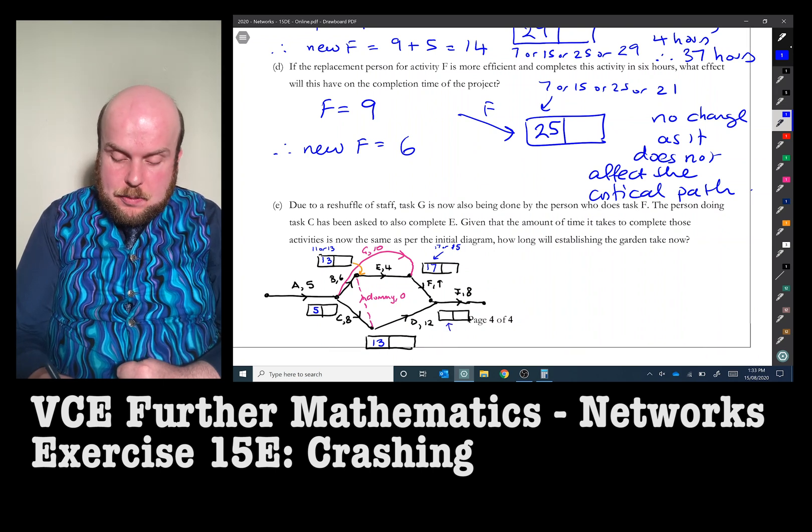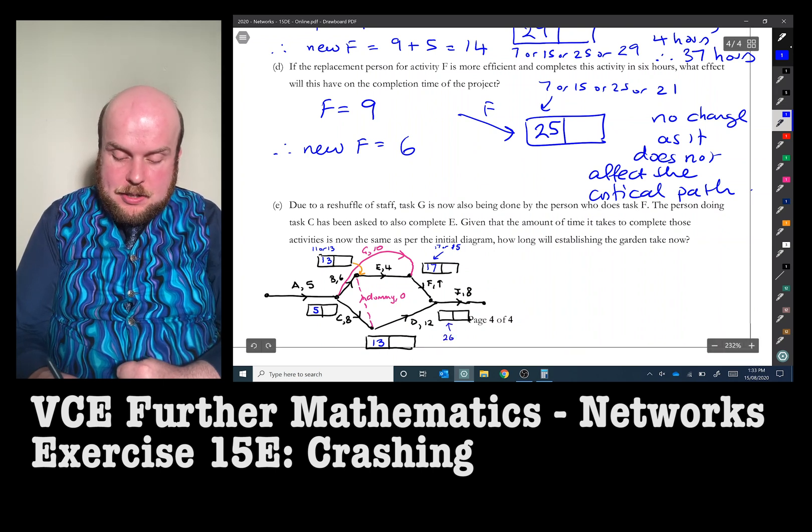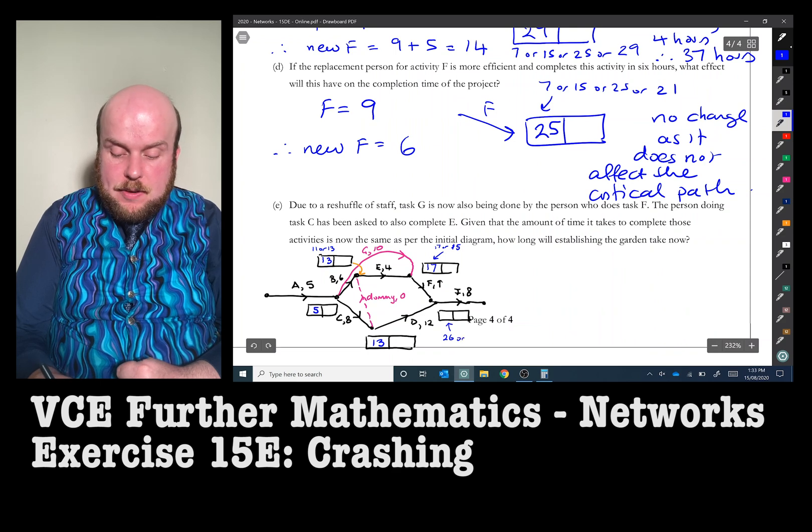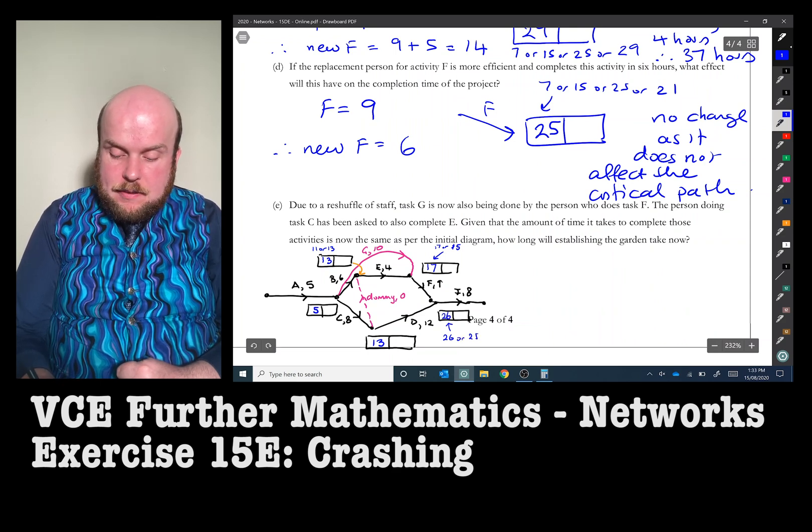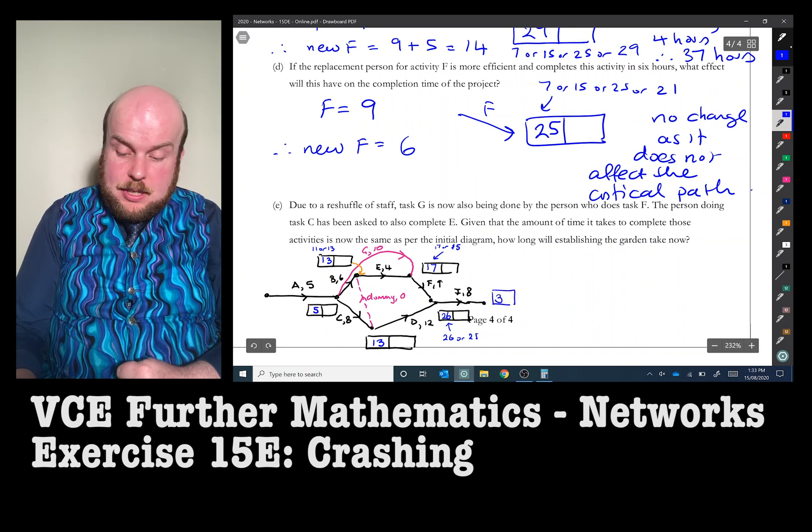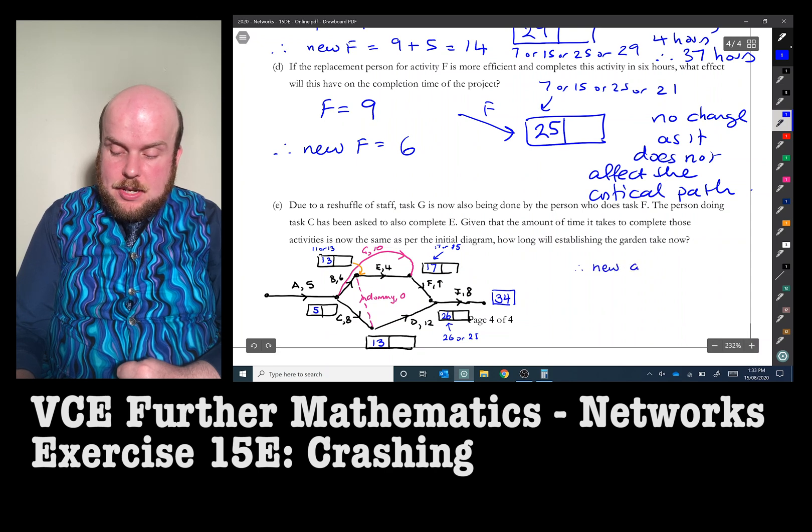So we now reach to this point. We've got 17 plus nine is 26, or we can go back to that 13 plus 12 is 25. It is 26. So therefore, 26 plus eight is 34. So the new completion time is 34 hours.